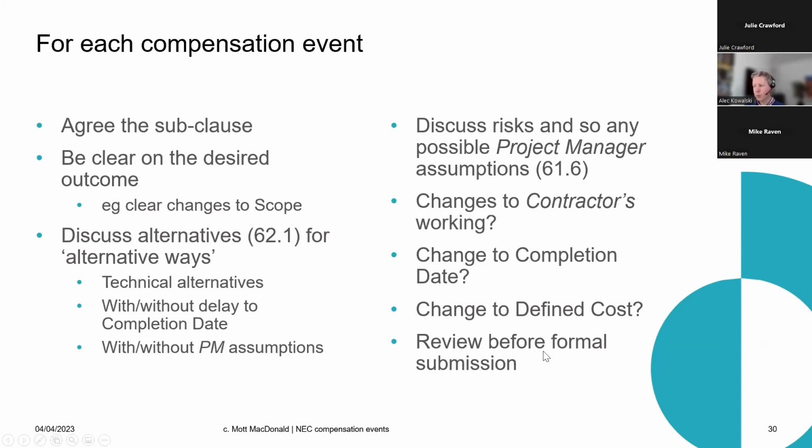Okay. Review before the final submission. That helps with agreement of these things. So they could submit it to you in draft, if you want. That's not a contract mechanism, but they could do that as a real world working mechanism. And then you can review it in draft, and when it comes to submitting the final one, it should just be a fait accompli.